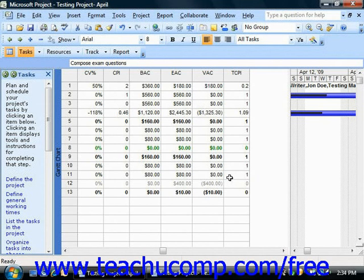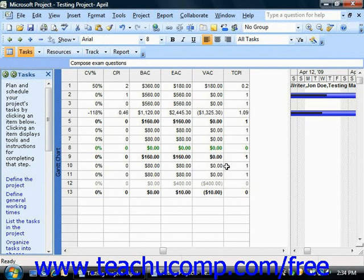Then you have the To Complete Performance Index, or TCPI, which shows the ratio of work remaining to the budget remaining as of the status date.